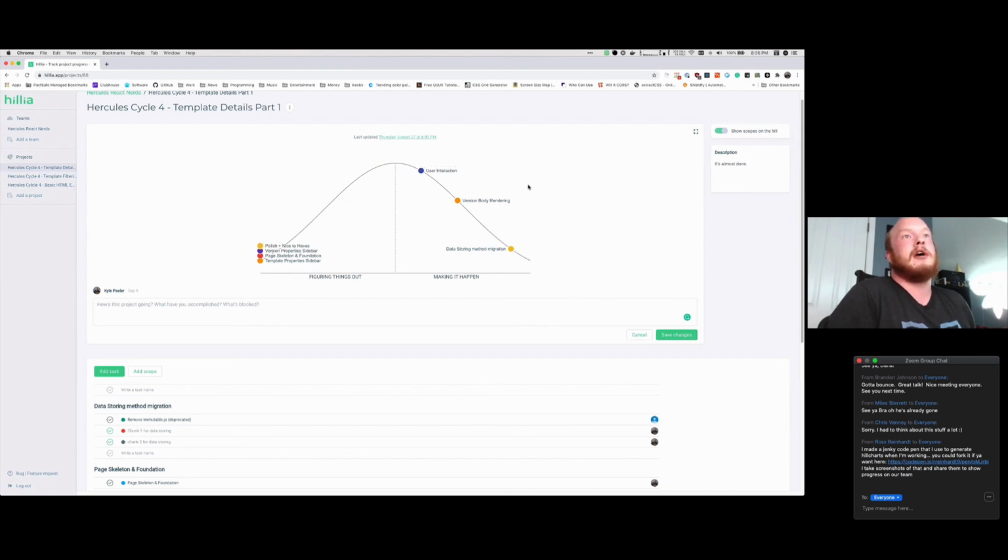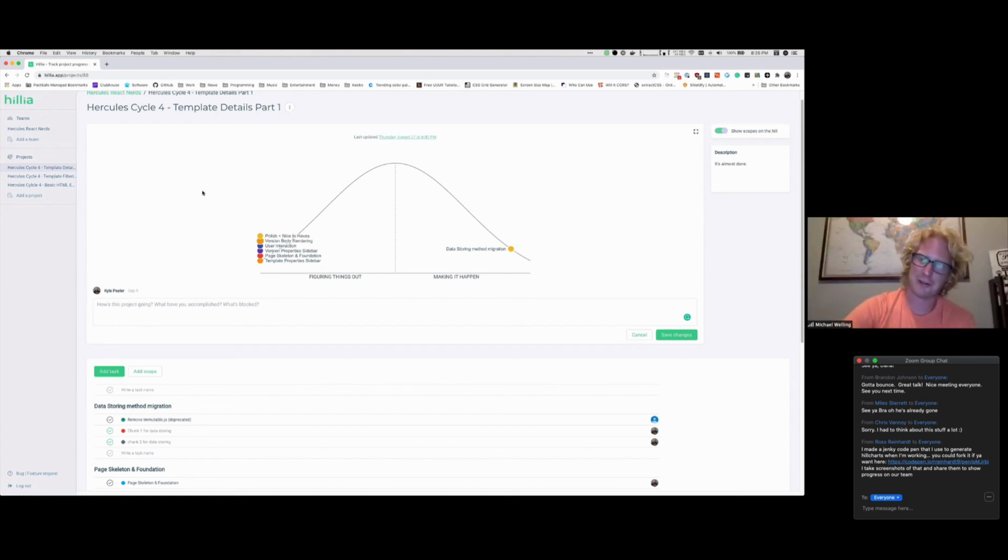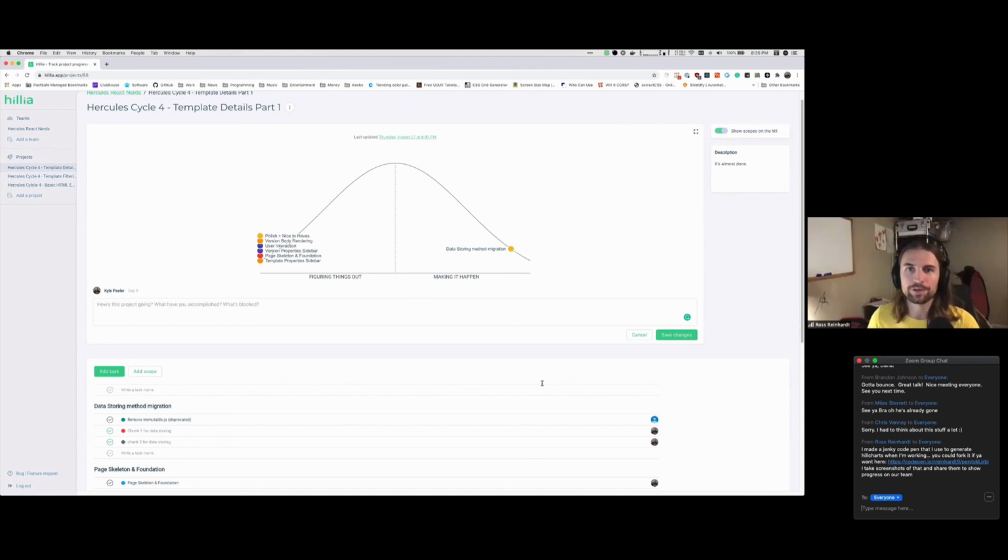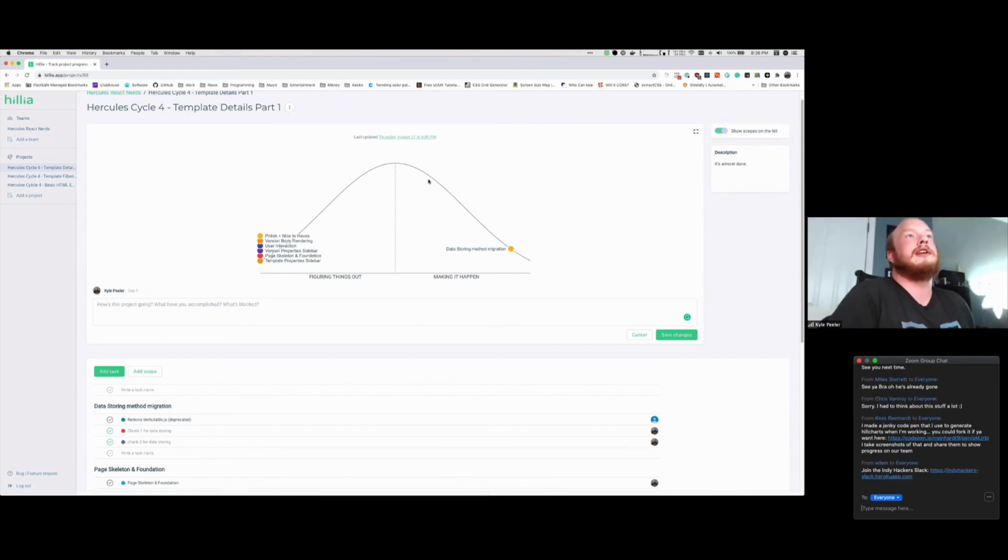But it is an alarm bell that it's not necessarily the developers who are the issue. Maybe this pitch wasn't scoped right, and there's something wrong here. That's when you'd want to start having those conversations about what is a must-have at the end of this period if it looks like we're going to land short. Yeah, it's an alarm that you need to adjust scope. You won't just drop everything and say screw it, but you'll definitely need to make some adjustments in what is getting delivered. Cool. Yeah, thanks, Kyle.